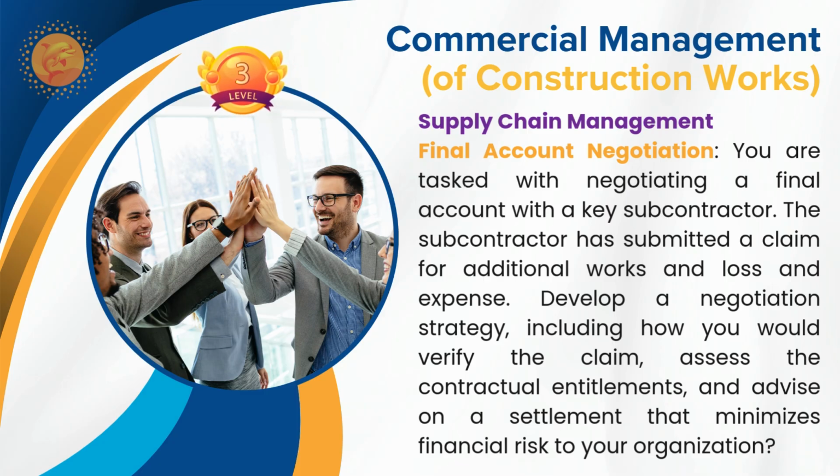Accordingly, I will manage and mitigate his future issues in the project. And if all these measures regarding the advance payment and extending the support to him are not successful, then I will use the termination clause in my subcontract agreement. In this way, I will mitigate the future issues in the project. Yes, that is a good example. It was your case study. Yes. Primarily, you have been doing the justification of that one. Yes, of course.